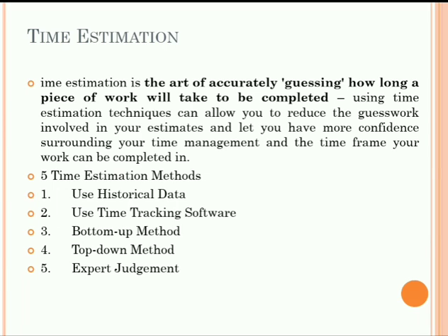This includes a work breakdown structure and information on project scope, analysis of external risks that may interfere with the timely delivery of desired outputs, and analysis of internal risks, including potentially inaccurate budget estimates and their possible effects on the project schedule. The key to correct time estimation is the use of hard evidence, avoiding being overly optimistic, and consideration of uncertainty.